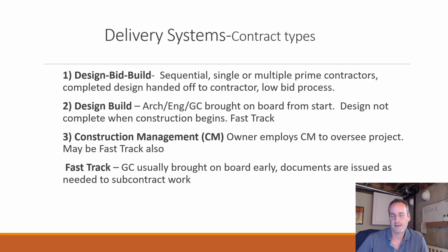And so it cuts out some of that lead time necessary. The third style here, construction management, is almost similar to the design build, but you just hire one construction management firm or person to oversee the entire project. And so that could be fast track or not, as you see.